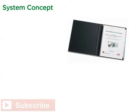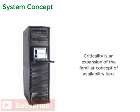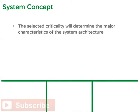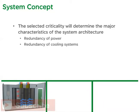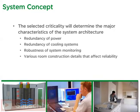The system specification and project manual that Crawford and Kelly had acquired provided them with the questions they needed to ask and the forms they needed to fill out. Their guidebook helped define the system concept for the rooms, establish a process for who does what, and allowed them to define the list of devices required. Criticality is an expansion of the familiar concept of availability tiers. The criticality selected will determine the major characteristics of the system architecture, such as redundancy of power and cooling systems, as well as the robustness of system monitoring and various room construction details that affect reliability.